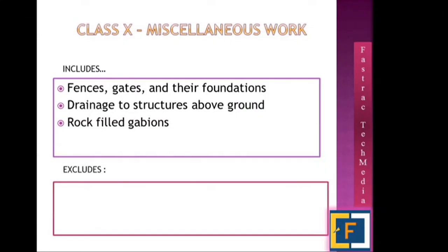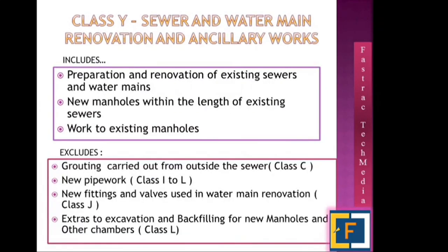Class X, fences and their foundation. This is the thing, the foundations. So while we were discussing PCC and RCC, these foundations are not included there, but they are included here. And drainage to structures above ground. This is very important, and the rate for these things is different. Rock-filled gabions, that also has a separate rate. Lot of people are confused about how to measure gabions.